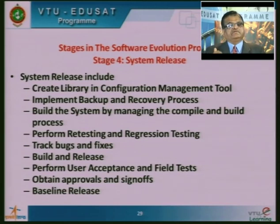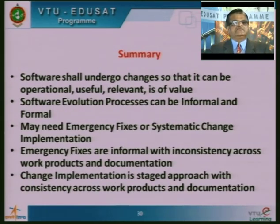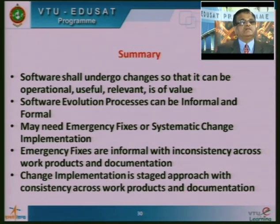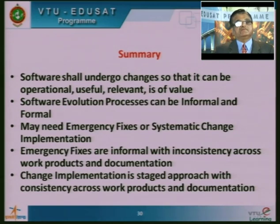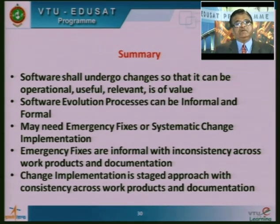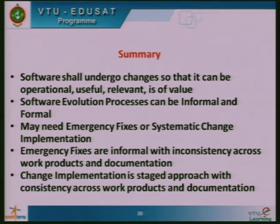After releasing, the customer carries out user acceptance testing and field tests to check stability. Finally, approvals and sign-offs are taken and the release is baselined — no informal changes shall be carried out thereafter. In summary: software must undergo changes to remain operational, useful, relevant, and of value. Software evolution processes can be informal or formal. Emergency fixes are informal with potential inconsistency across work products, whereas systematic change implementation follows a staged approach with consistency across work products and documentation. This concludes our session on software evolution.